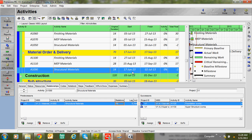Here, this activity coming under material order and delivery is linked with the material submission and approval of structural materials. Structural materials include cement, sand, shuttering materials, hook steel, and so on. This activity is linked with a Finish to Start relationship. The finish date of this activity is 16th June, and the next day material order and delivery will start. This is called a Finish to Start relationship.